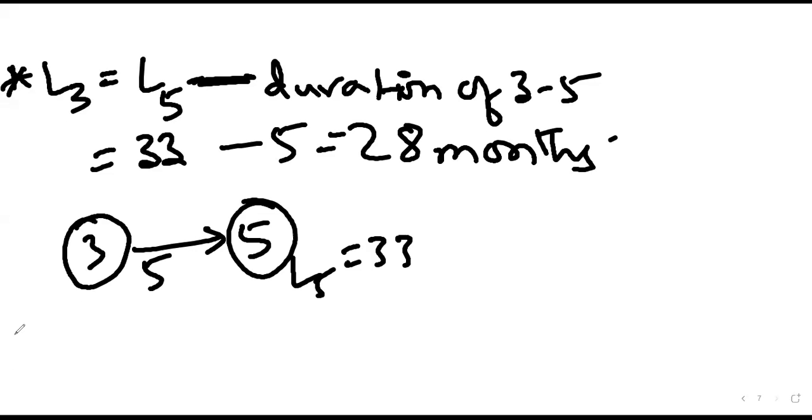Okay. So how many equations do we require for L2? Two. How many equations are required for L2 calculation? 3 equations. That's right. 3 equations are required for L2 calculation. And should we consider the maximum or minimum? Minimum. Yes. So minimum has to be considered for L2 calculation. That's right.